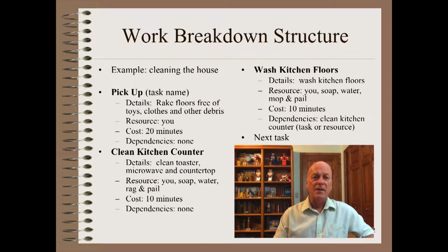This structure lends itself to computer programs because the elements of the subtask can be listed in a database, or spreadsheet if you like. In this example, we detail the elements for a routine kitchen cleaning. Note the dependency we listed earlier that you need to clean the counters before you clean the floor.